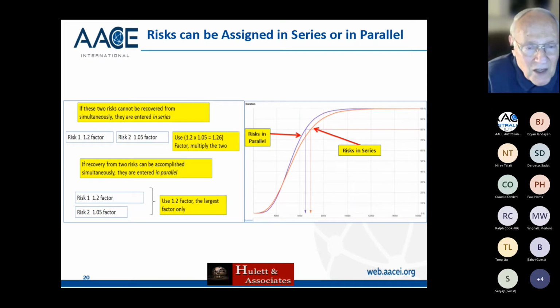So in many iterations, you've got 4 or 5 risks actually happening. And all of the things are, unfortunately, threats, so their impact is over 1. You start multiplying 4 or 5 numbers that are over 1 to the duration of an activity, you're going to find a duration that nobody will believe. It's too high. It's very much higher.